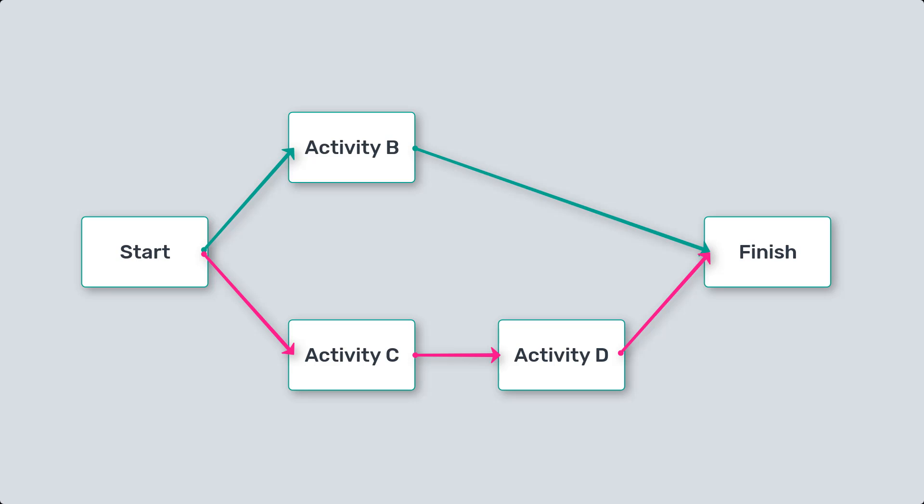These tasks are interconnected and have zero float or slack time, meaning any delay in these tasks will directly impact the project's overall duration.